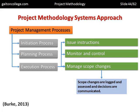Manage scope changes — scope changes are logged, assessed, and decisions are communicated. Scope changes occur when what a project is aiming to achieve has been widened: management wants it to achieve more, or it could be used in different contexts not originally planned. Or it could go the other way — it's been reduced in scope. Make sure that's been managed with good information flow, and that any changes management require are communicated in good time, are feasible, and that meetings can find solutions to accommodate those changes.